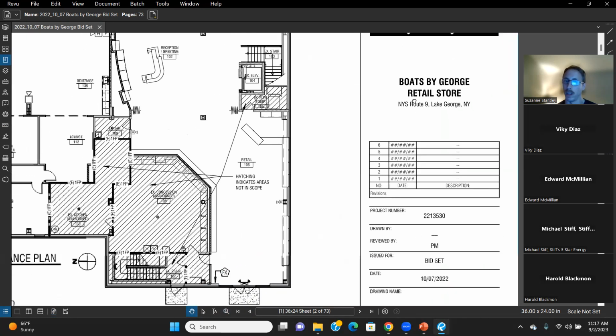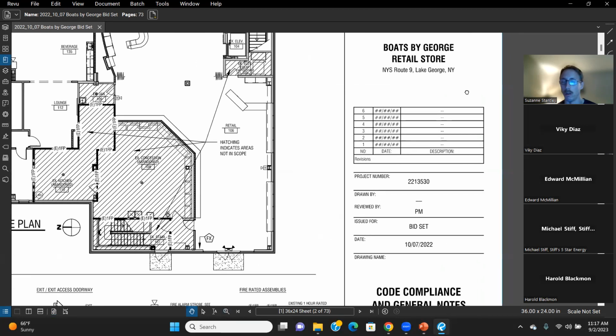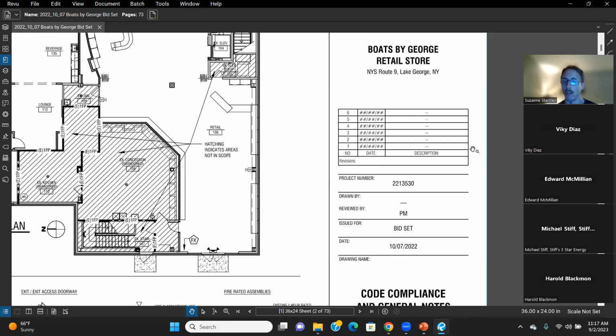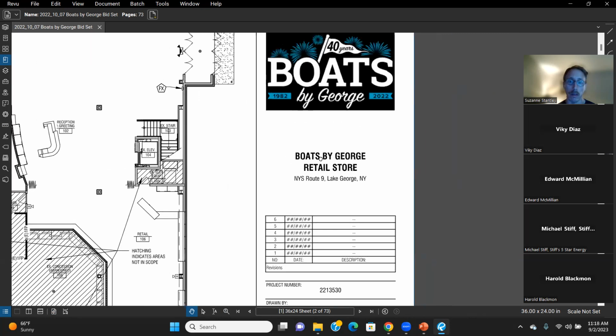So I think Wednesday, I said if you're not doing design build or you're not involved in kind of the design phase, that you don't need to worry about that. And that's not really true. This will also keep track of changes made after they've released the documents. So this will track addendum. And we'll revisit that when we're going over estimating and takeoff, but I wanted to clarify that.